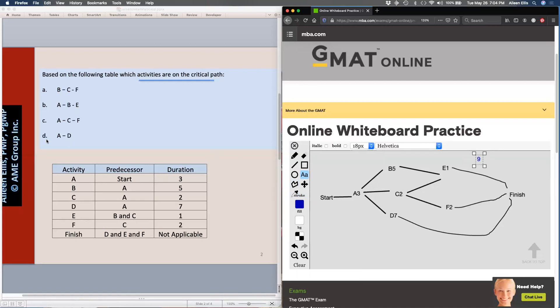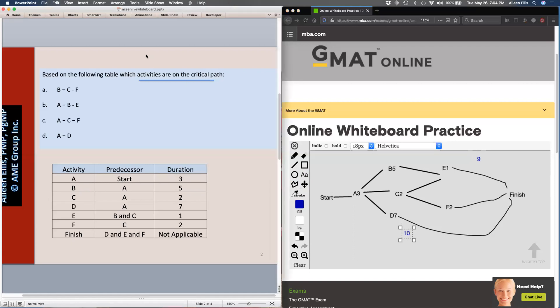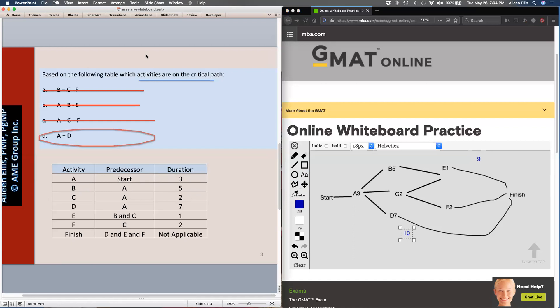Then I go to answer D: A to D, three days plus seven days — I know A to D is ten days, which is the longest path. So coming back over here, A to D are the activities on the critical path.